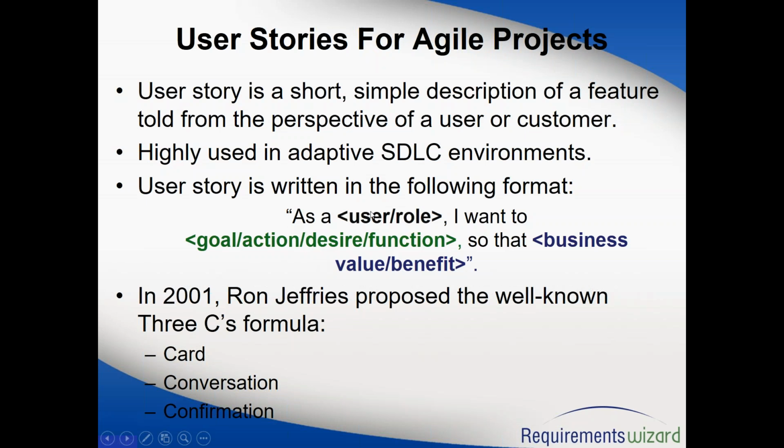So in this example, the same login example, on the back side you will write an acceptance criteria, which would be similar to, verify that once the ID and password is entered, and the customer submits the request, the system authenticates successfully and gives access to the account.